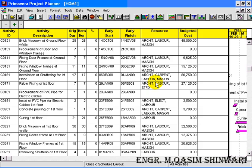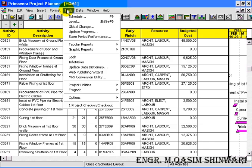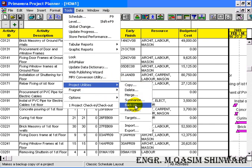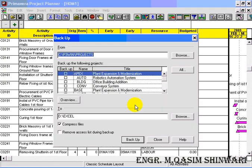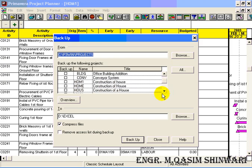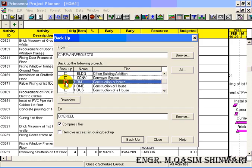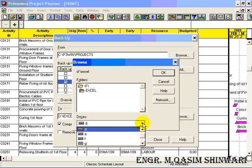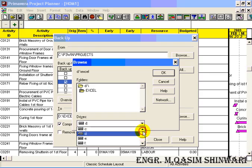So that if you mistakenly do something, you can regain your data. To make the backup, go to Tools, Project Utilities, and here click on Backup. So select the project for which we want to have backup. I want the backup of Home One, so check this backup checkbox.